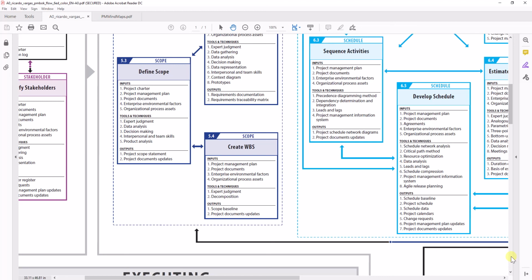In mind mapping, you start with a central idea and then you branch out into each of the subcategories, and you do your thinking in a slightly guided manner. Unlike in brainstorming, you also look slightly at the quality of the ideas. So as you branch out, you go to the sub themes from the central idea listed at the center, so that you can see associations between different ideas or between different idea groups.